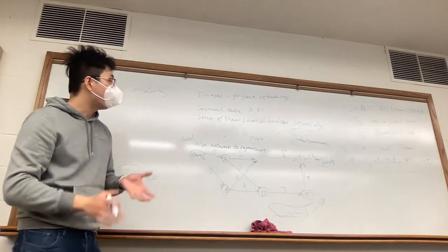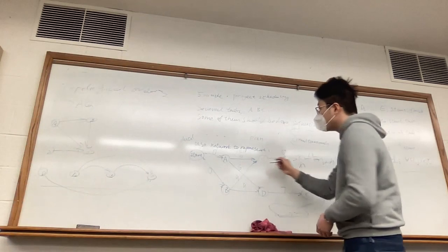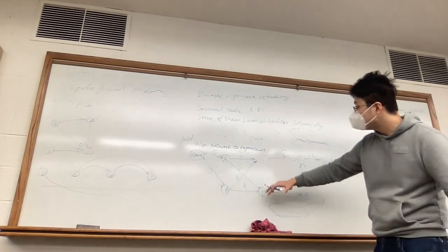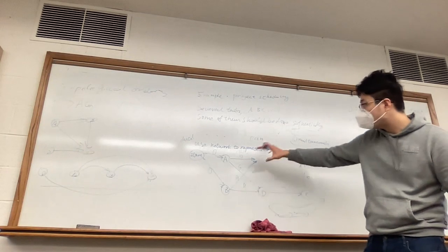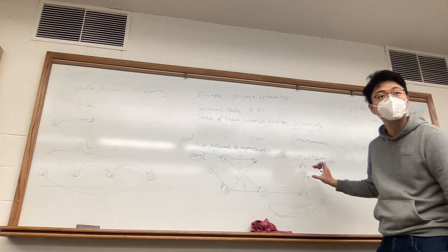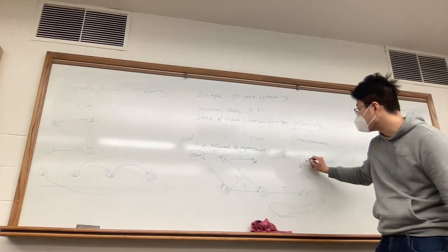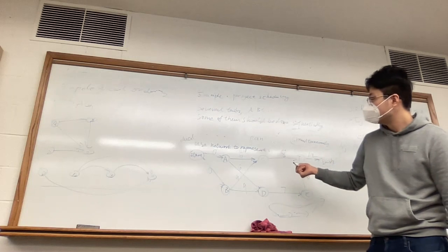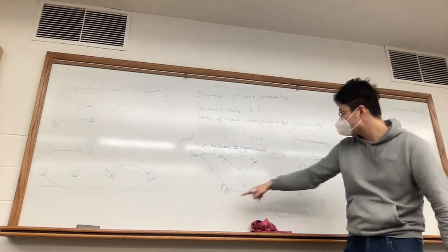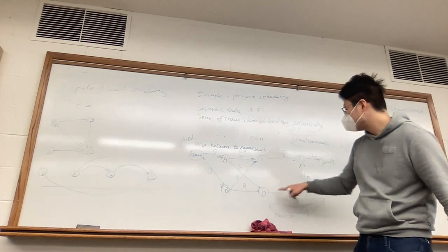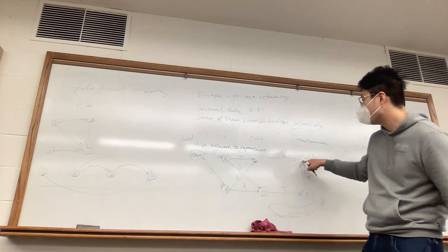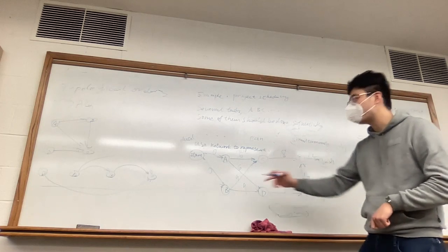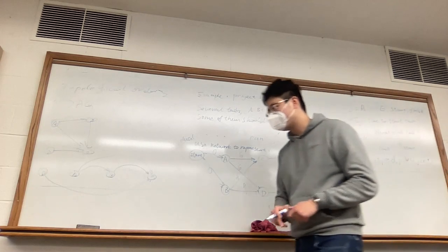And the reason why we only point from F to finish rather than from C or D to finish: can you do that? No. Why? Because C and D have nodes behind them in the topological order. So F has the highest topological ordering. That's the reason why we just point from F to finish. So this is like 100 level courses, 200 level, 300 level, and 400 level courses, and then you graduate, right? But make sure that you pass all of them. Otherwise, you fail and you will not get your degree.